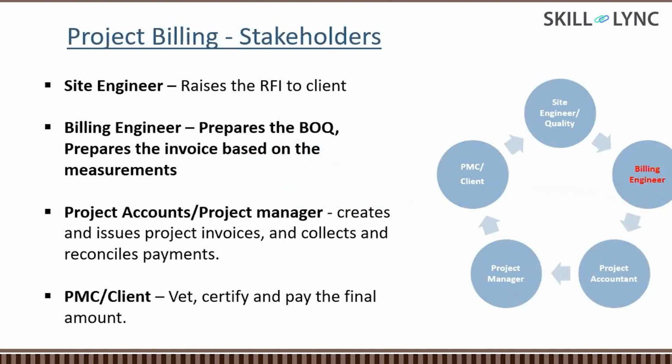He will be vetting all the design engineering drawings with respect to the quantity executed. Then, with the help of the project accountant, they will be raising a pro forma invoice, because the accountant will know what amount was certified in the last bill, and what deductions and recoveries should be there in the invoice. So ultimately, the project manager, who has the authority for that particular project, will be signing on that particular bill, and that will be given to the client.